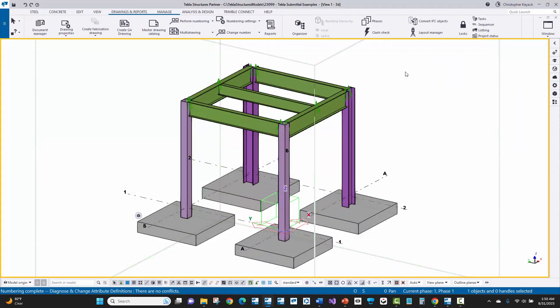Now, the next step is to determine whether or not we need to assign preliminary marks or advanced mill marks to the steel in the model. If the fabricator is looking for an ABM mark or a preliminary mark to be tagged to the steel, this is requested typically because they want some sort of tracking mark to be able to identify which pieces are being nested into different bars that they're putting on a mill order to the mill. They then want to be able to remember those pieces that belong to different bars, especially when they tie this back and compare it to an issue for fabrication or issue for construction release. And they want to make sure that they have all of the correct material and then also look for any materials that potentially have changed. So this ABM or preliminary mark is often used as a traceability to compare what they ordered at an advanced bill order compared to what they actually are going to fabricate and put on cut lists.